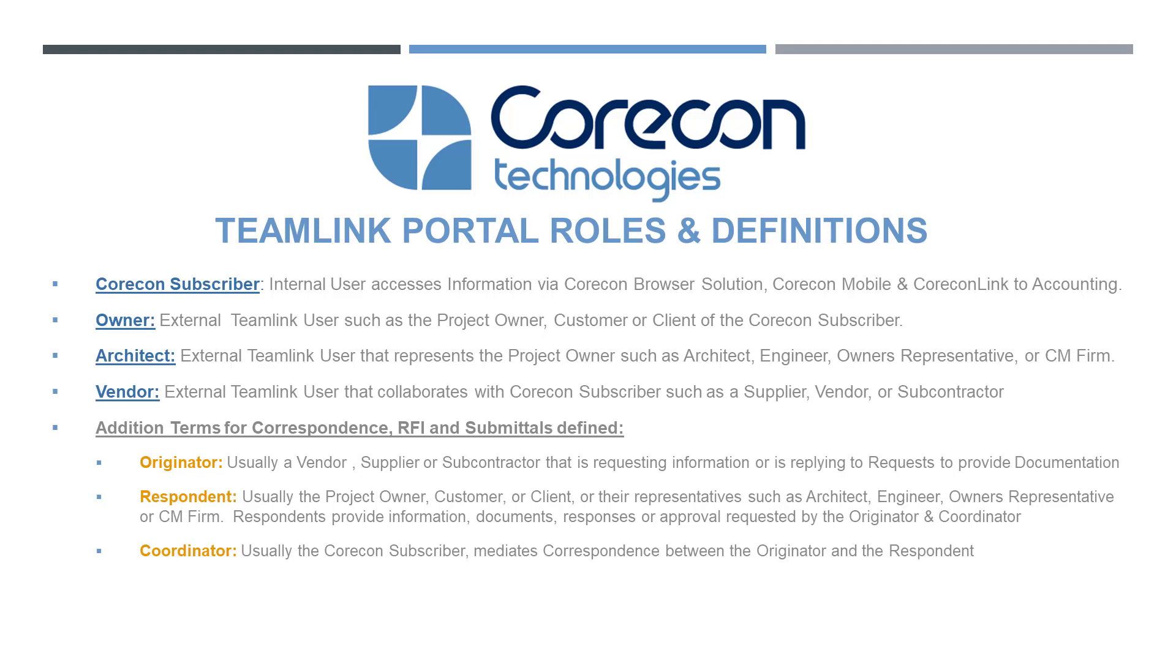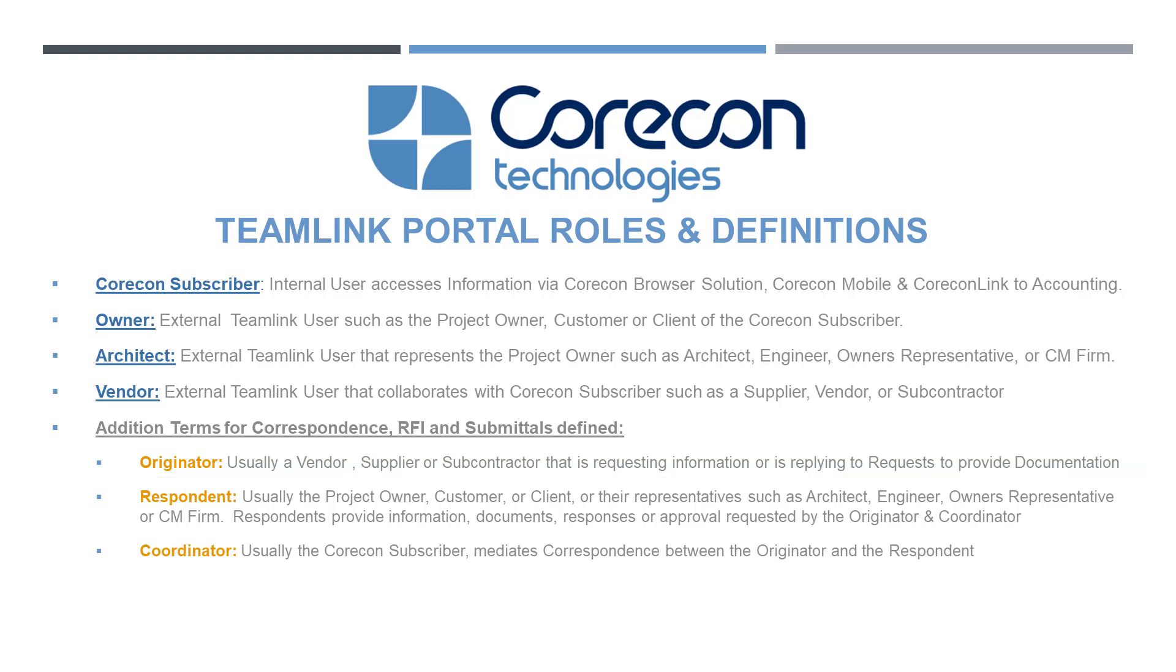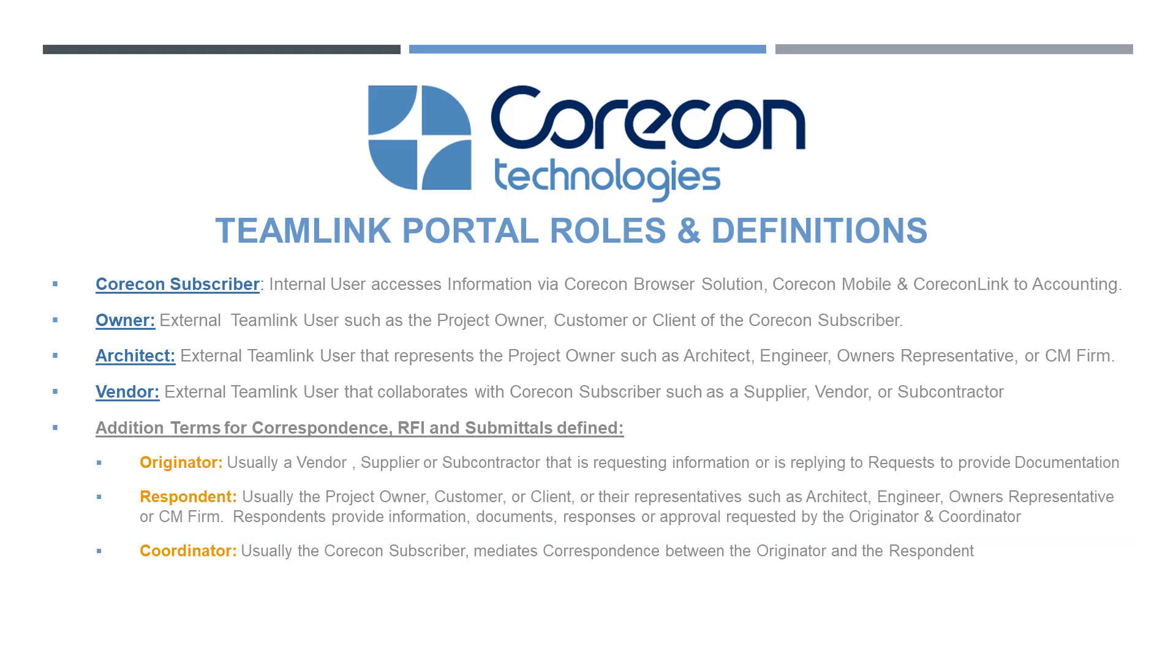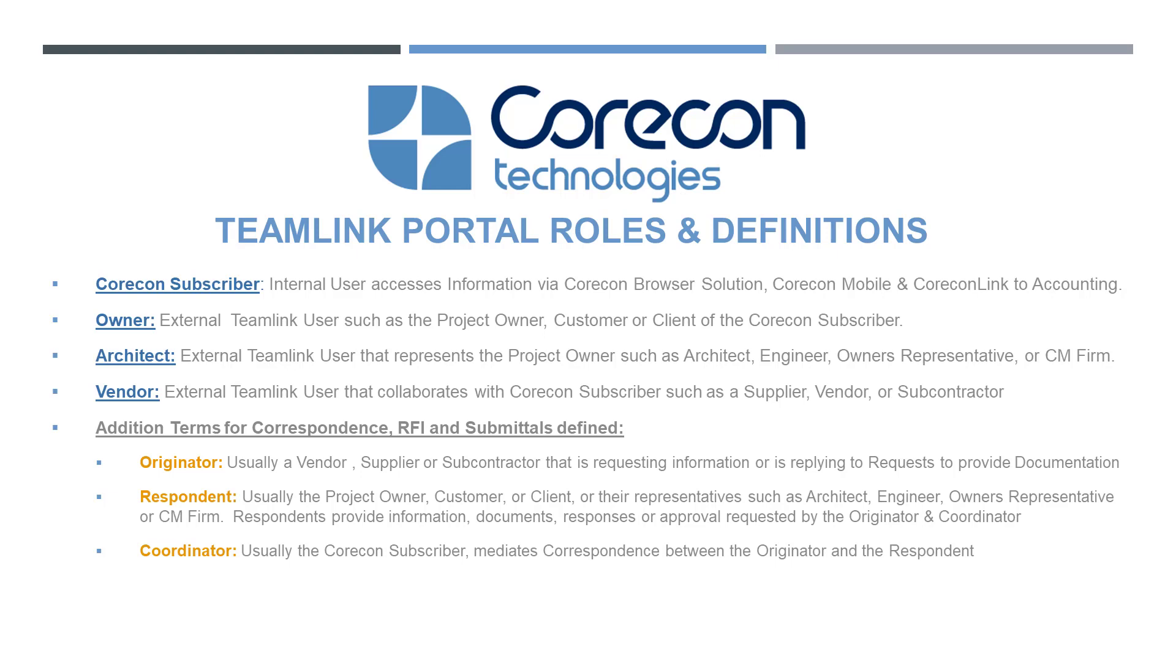An RFI or submittal has an originator, a respondent, and a coordinator. The originator is usually a vendor, supplier, or subcontractor like you that is requesting information or is replying to requests or documentation. The respondent is also an external user and encompasses the project owner, customer, client, or their representatives such as the architect, engineer, owner's representative, or CM firm. Respondents provide information, documents, responses, or approve requested information coming from the originator or coordinator. The coordinator is usually the Corecon subscriber. They're the mediator of correspondence between the Corecon subscriber and the originator, and also the Corecon subscriber and the respondent. If you fit under the role vendor as an external team link user, you're probably also going to fit into the role when it comes to RFIs and submittals called originator.